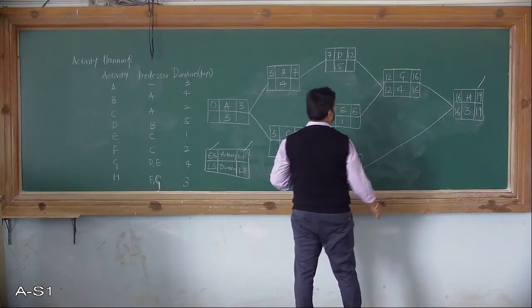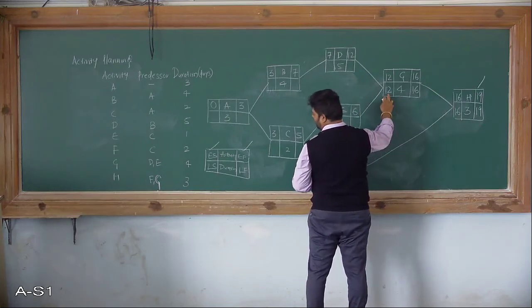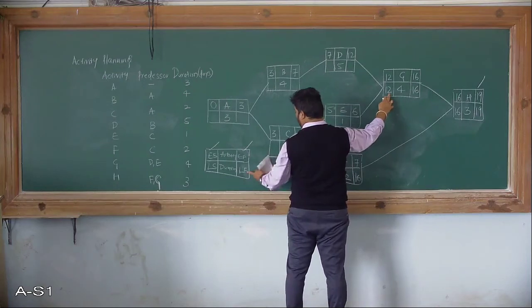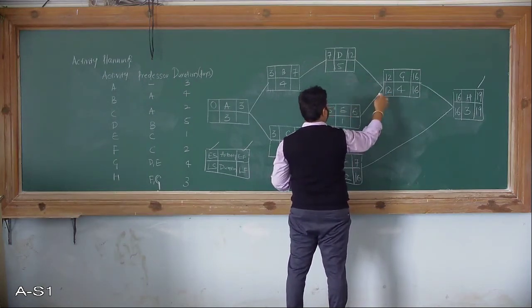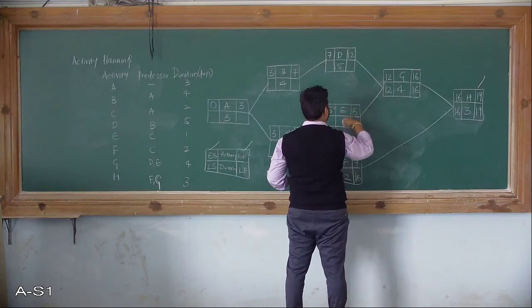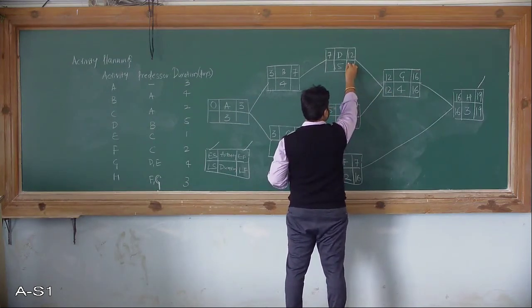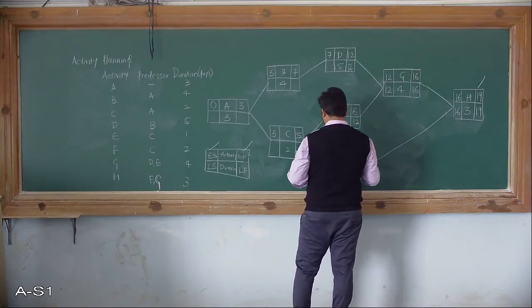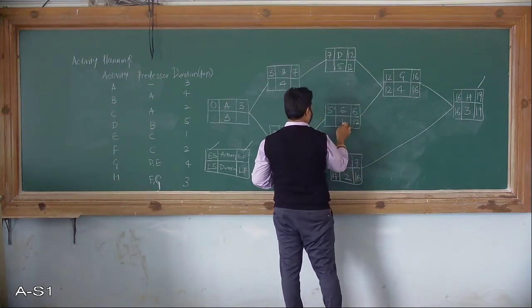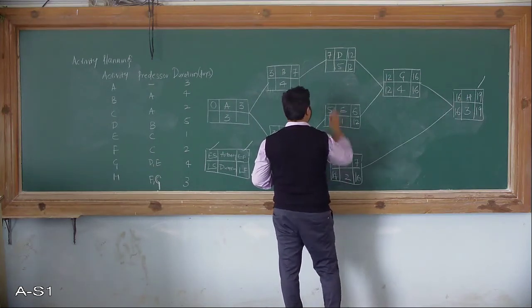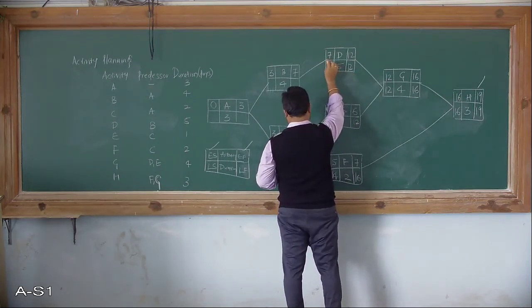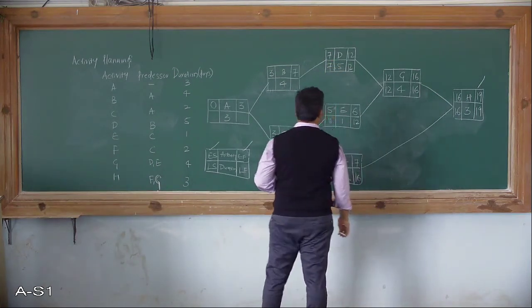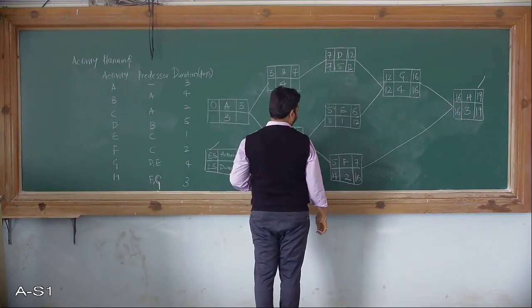So then you can observe the late start, 12. That 12 will become the late finish for these two activities, because these depend on these two. 12 comes here, 12 comes here. 12 minus 1 is 11, 12 minus 5 is 7. Fine.